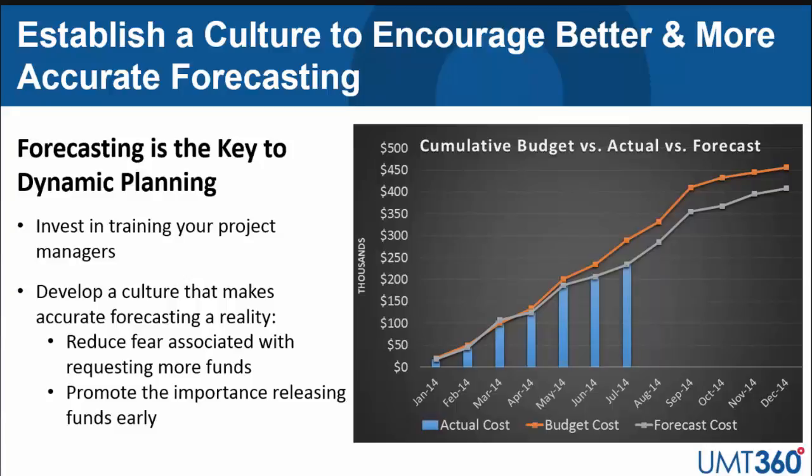Why that's important is often we go to customers and we ask for forecasts. And project managers simply just take the approved budget and subtract the actuals and say that's what's remaining. That's not what we're looking to do here. We're looking for a strong gut feel in terms of the money you will need, whether it's higher or lower, to complete this project.